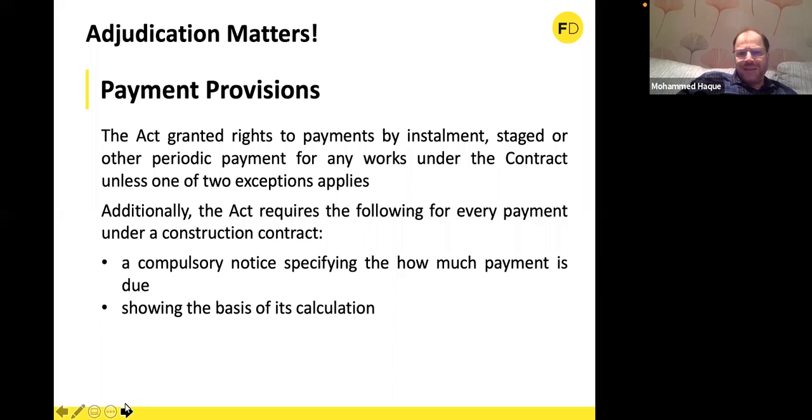It's a bit rare these days, at least in England and Wales; we don't get that. But that's the first payment normally, either even before mobilization or at the time of mobilization, just after the mobilization. Contractors are very lean on their cash, so it's in the interest of both parties that an amount is handed over to them so that they can buy materials and organize a mobilization, because mostly these are on hired things, and the project starts and gains speed in no time and proceeds at a proper pace. So that's how it is organized.